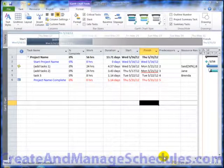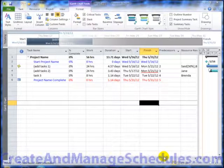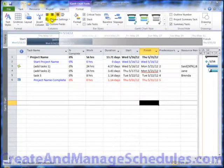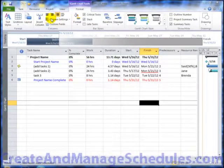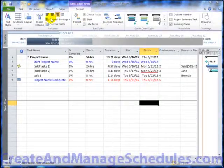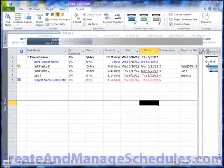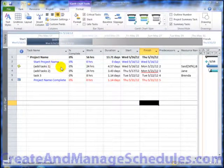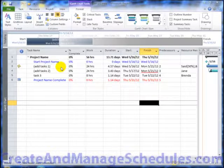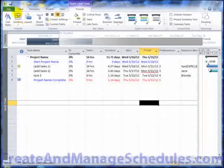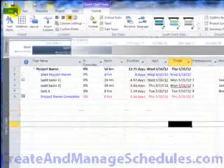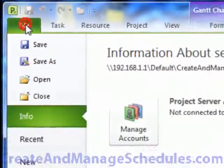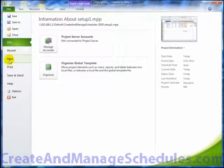So in terms of creating templates, Project 2010 is set up to help you save time and easily create and access existing templates. So what you would do is in Project 2010, once you've created your project plan that you want to use as a template or if you wanted to just download an existing template, you would click on the File tab to go to the Backstage area and when you click on the New option,